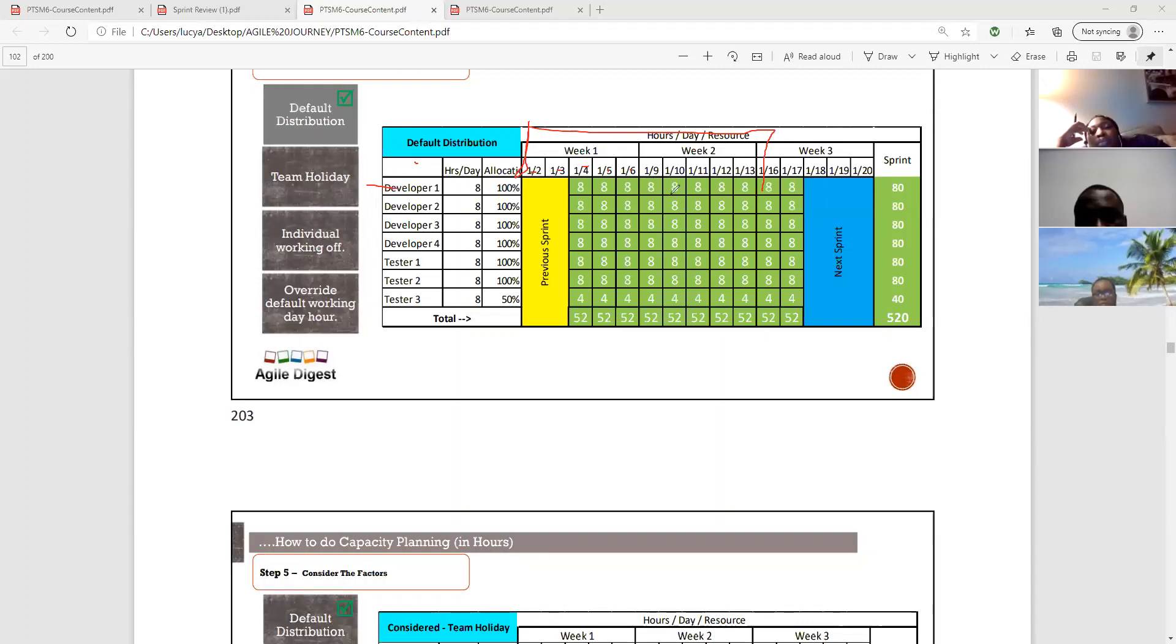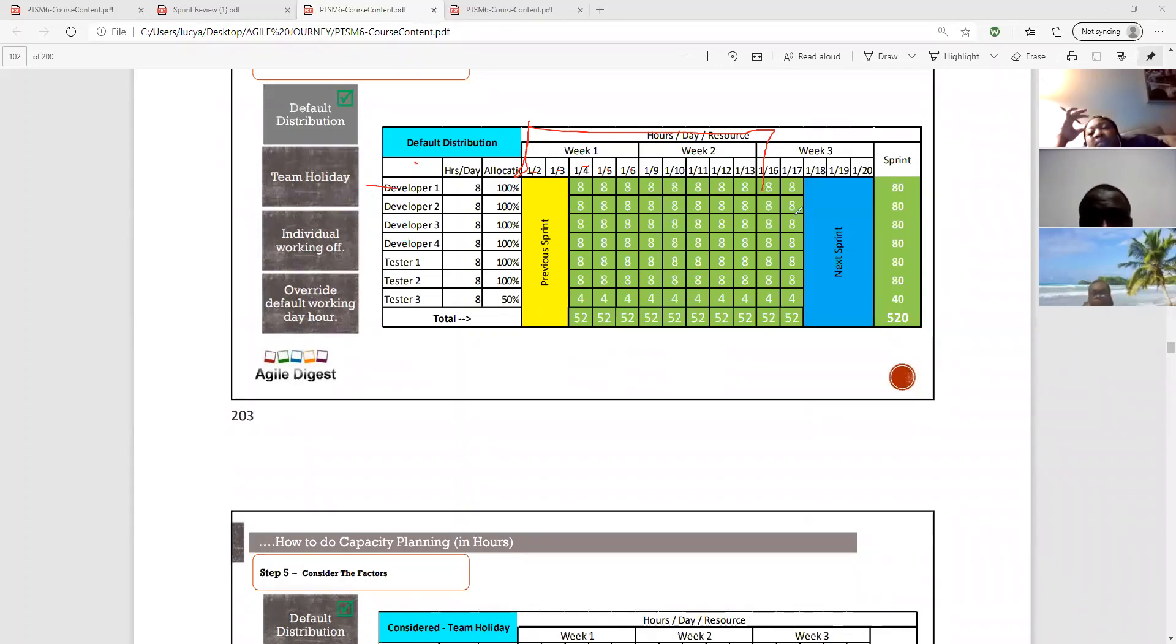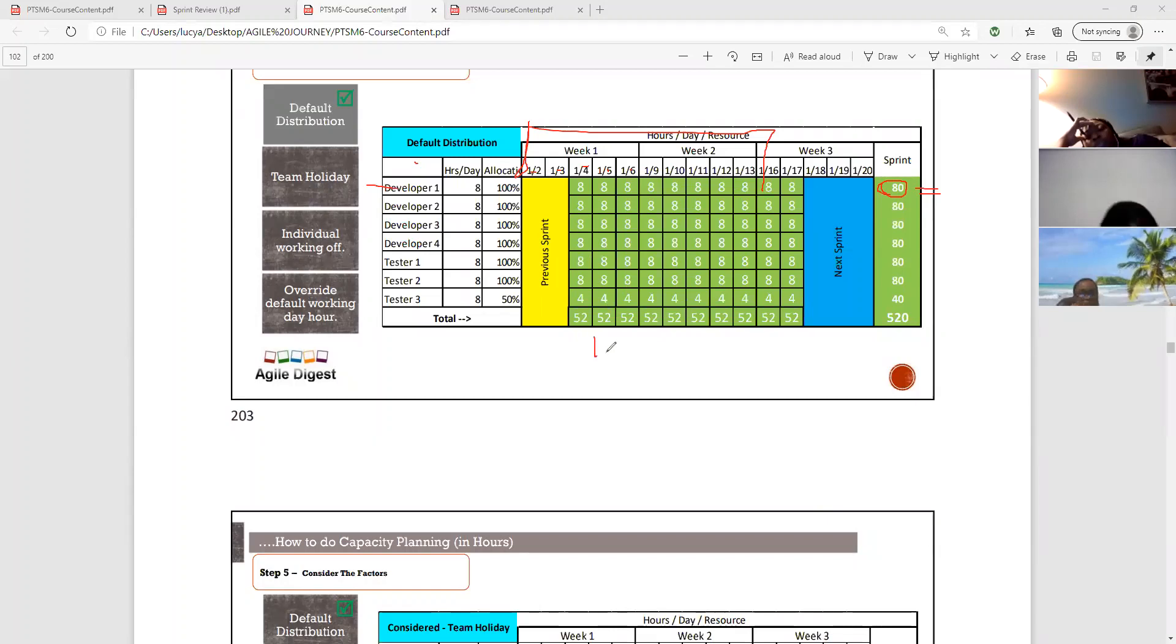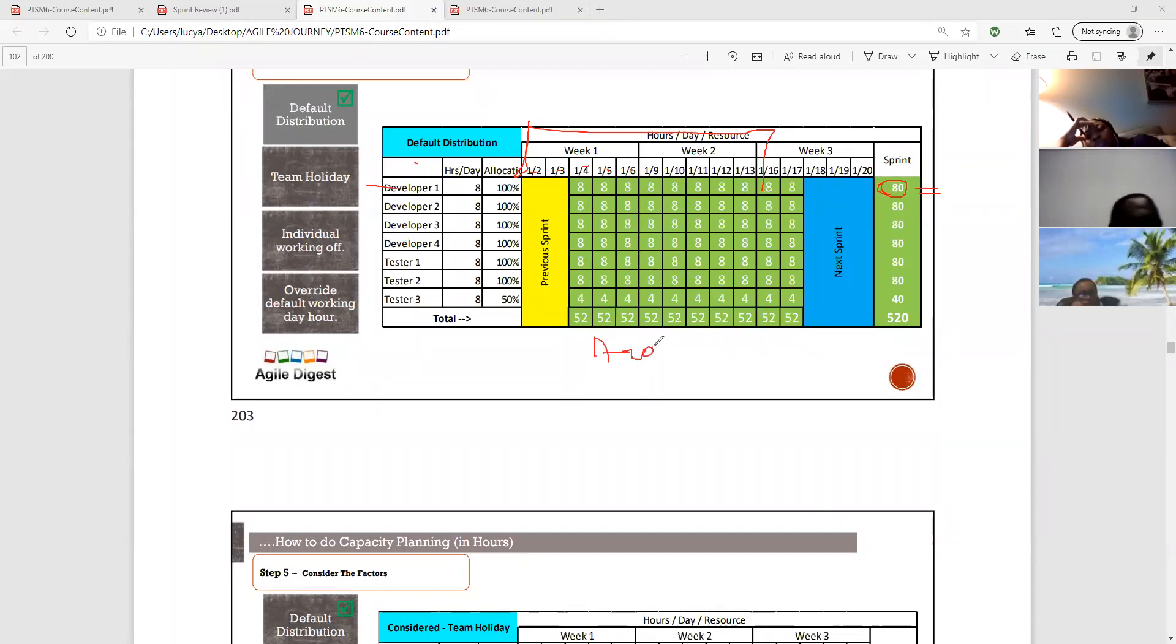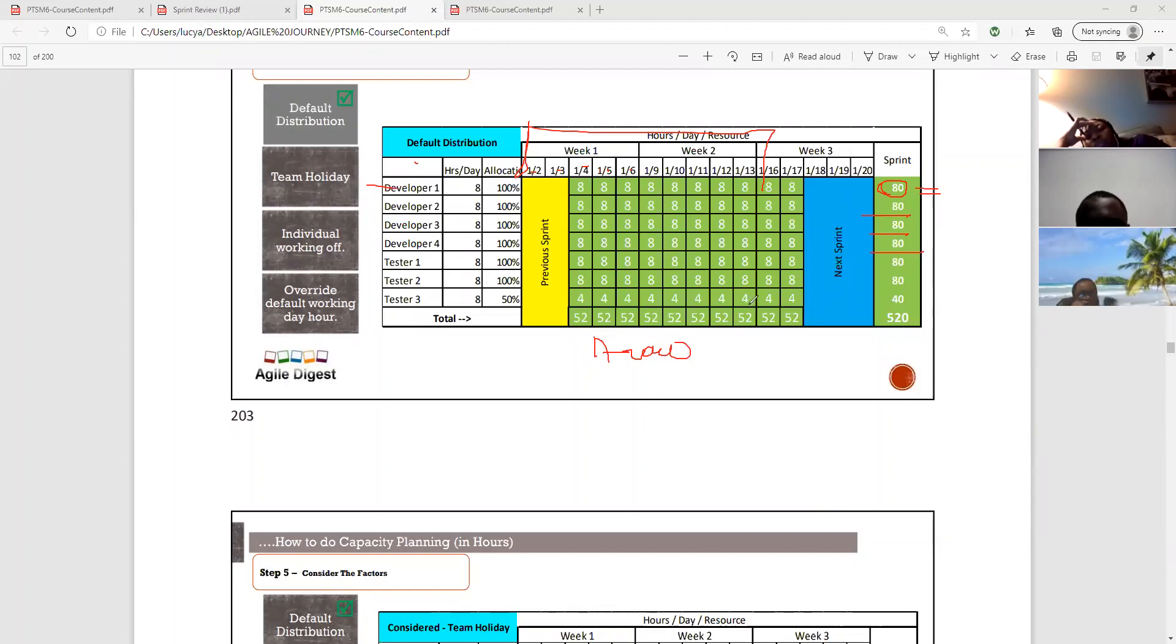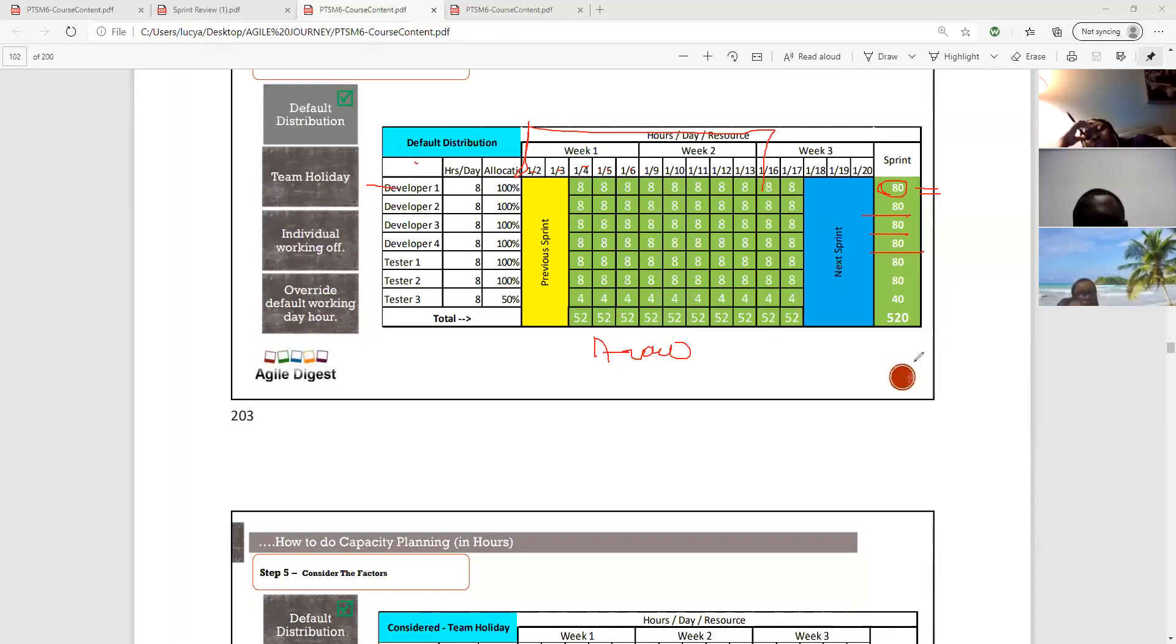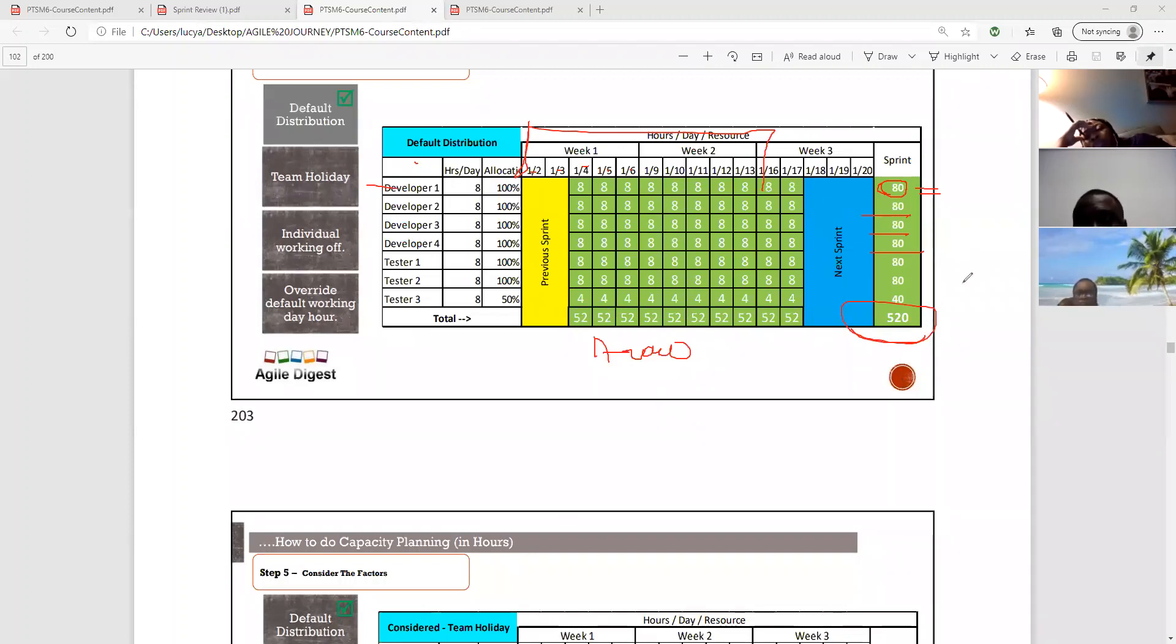because for a two-week sprint, you have 10 working days. So you're going to have 80 hours available. So this is what I will call available capacity. This is what is available. Everybody has eight hours in this diagram here. Now, if you take these developers, you're going to see that the 520 here is going to be the total number of hours that each one of them will have for this time period.